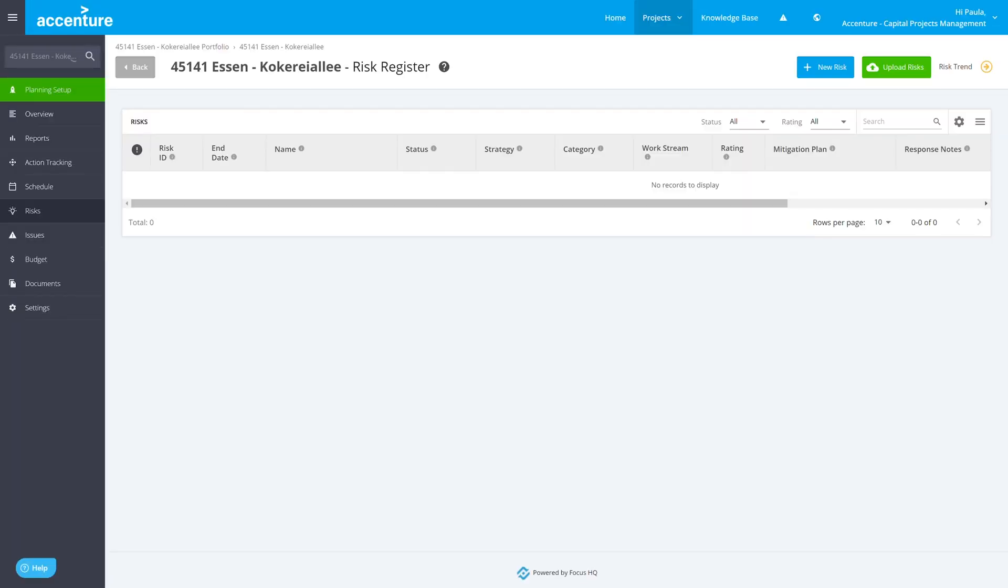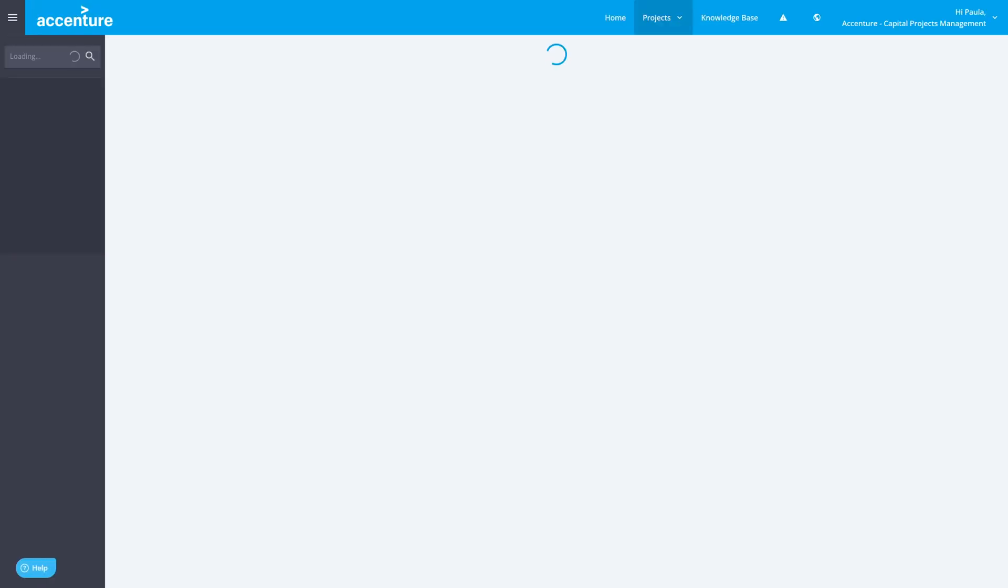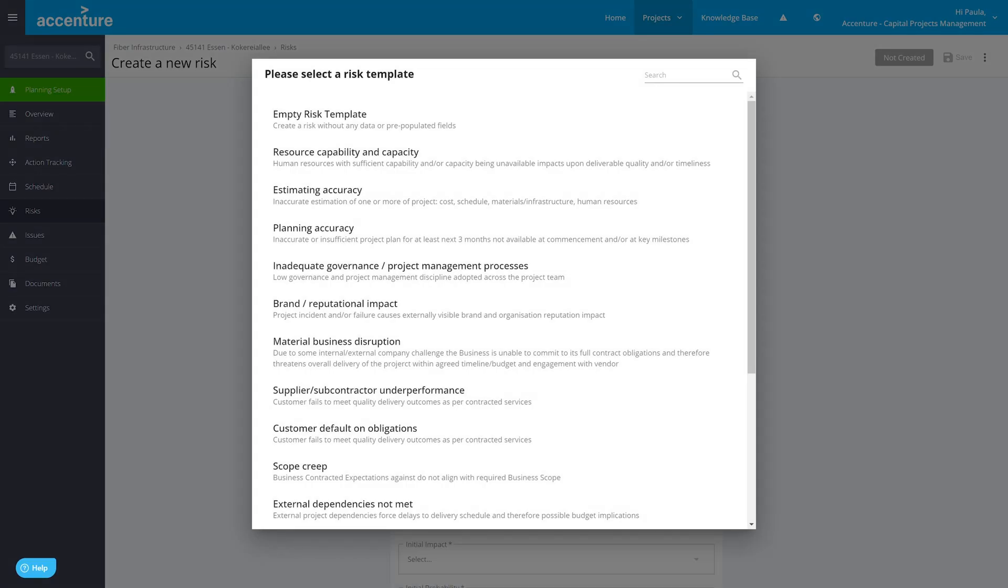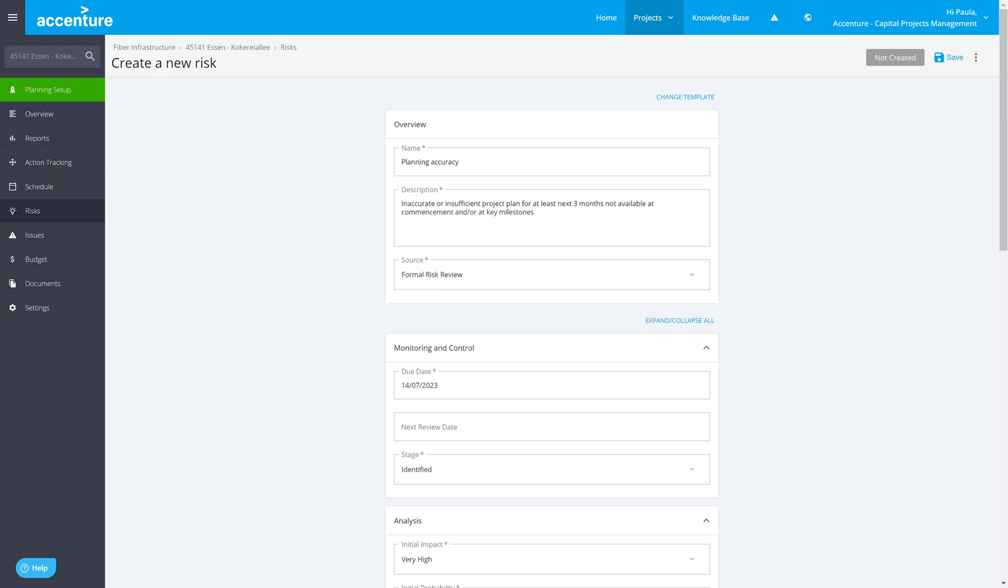Risks can be created, it's basically a ticket, but I can raise the risk, I can rate it, how important it is, what the potential impact of the risk is. And I have a large number of different templates for that. For example, this problem, I don't have some information ready, available now, or potentially not coming. So, this might have an impact on my planning accuracy. It already pre-defines the descriptions to make it easier for the people to just enter this stuff.